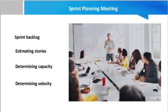Next is determining the velocity. You will want to look at the team's velocity and capacity together. When determining the team's velocity, the Scrum master or product owner should be ready to use examples from the past few sprints or previous projects to indicate how quickly the team usually finishes similar work.